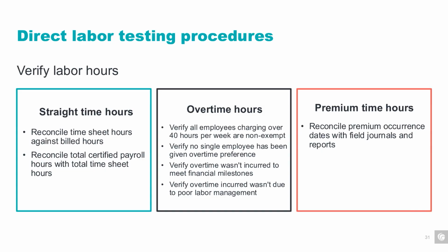For premium time hours, you want to reconcile the dates these premium time hours were charged with field journals and project reports to confirm that the premium rates were warranted. You also want to make sure that the time wasn't billed for routine work or without proper authorization. Overall, the verification of labor hours is essential for preventing overbillings, detecting errors, and ensuring compliance with the contract terms.